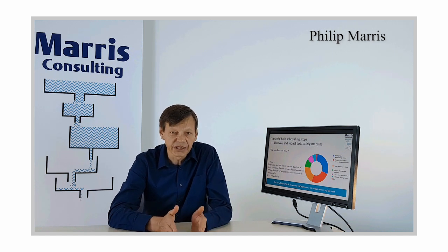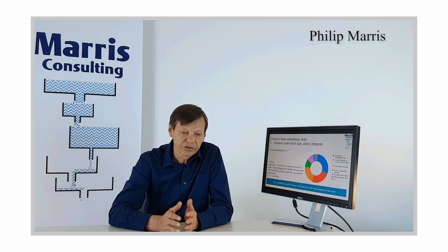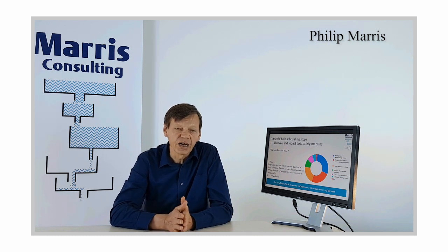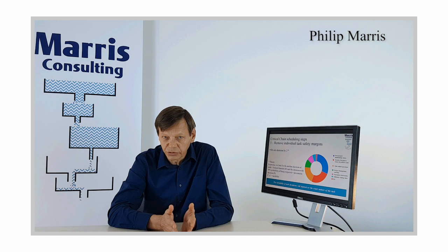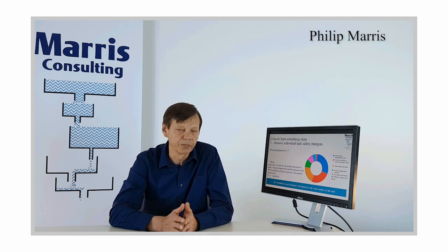And I want to make this very clear because it's led to a lot of criticism of critical chain in various places. And there are 2 very different ways of reducing the durations of tasks. Okay, and it's true that many books, even Eli Goldratt himself, describe one way of getting rid of local safeties as dividing all the task durations by 2, right? A top-down managerial decision, I will divide all the times by 2.